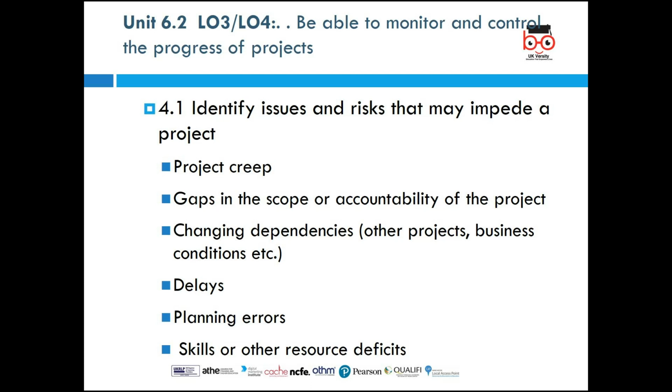We've also got changing dependencies in terms of other project and business conditions. Often we have a lot of projects running parallel to each other. So all projects are competing for the same time and resources. So other project dependencies are also likely to cause the project to delay.